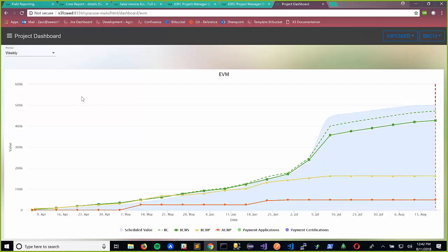So we redid the calculations as to how we were handling that. Expenses now hit on the day they actually occur, or we still break it down by a week-by-week period, or whatever you choose in the top left-hand corner there. But the expenses hit within the period that they happen in instead of only once the WBS node closes. So our chart is more real time. I know that kind of sounds weird, more real time.